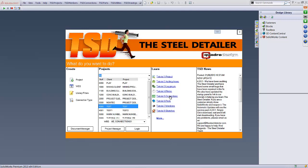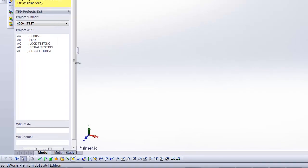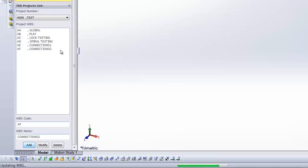I've created a WBS in my test area with code 4000. If you haven't got a test area, I suggest creating a project test area for playing and testing. I also have a connections area. To create a new WBS area, click on WBS on the left-hand side, which takes you to the current project. You can see the WBS code — I use caps. Type in the name, scroll down and click Add to create a new area. You can also modify existing area names and delete codes, but be careful not to detach yourself from an area you've been working on.